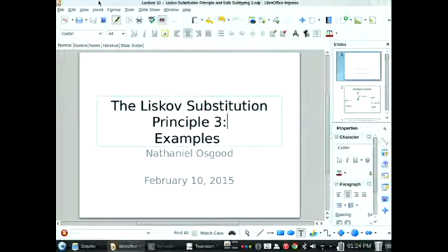Past teams have said that without understanding the critical path, they would have felt really in jeopardy in this class. So it's a nontrivial concept, and it can help guide your efforts. You can shift effort sometimes from non-critical path things to the critical path. You can monitor whether something is coming into the critical path, in terms of it taking a lot longer than we think, and now we think it might delay the whole project. And that can allow you to make better decisions about where you're devoting your efforts. Does that make sense? So we'll have a lecture about this. You'll find lectures of me talking through this material online if you'd like to go watch it.